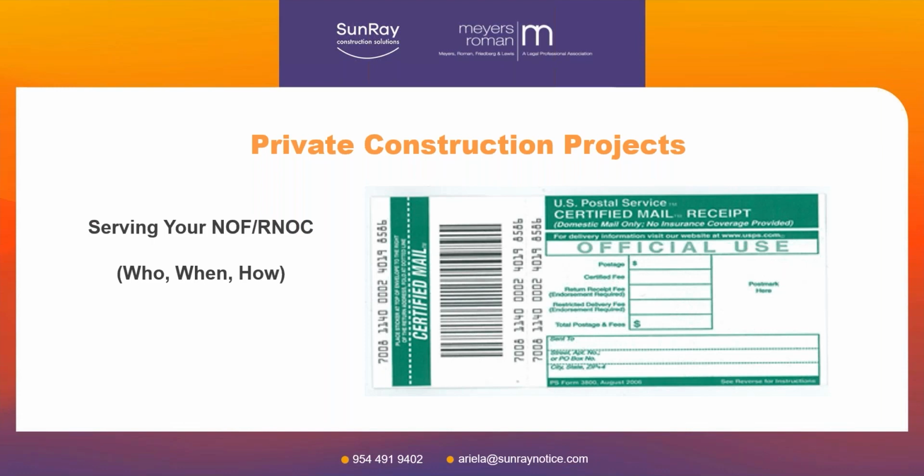By the way, I have clients who call me and say, oh, we forgot to do a notice of furnishing. This fell through the cracks. What do you think? Let's not do notice of furnishing at all, because they'll never know. You know, we file a lien. They're going to talk to their lawyer. The first thing the lawyer asks me is for a copy of the green card. So if you don't have it, you're going to be toast and not have lien rights.